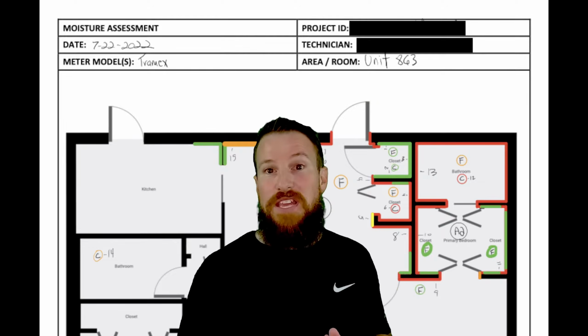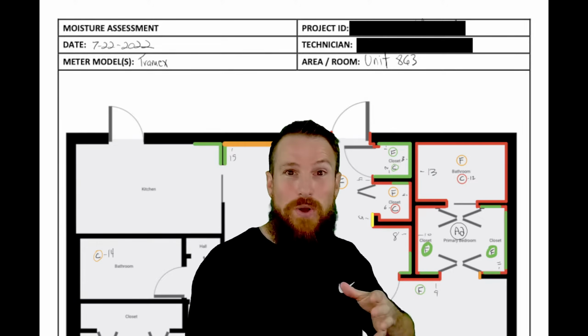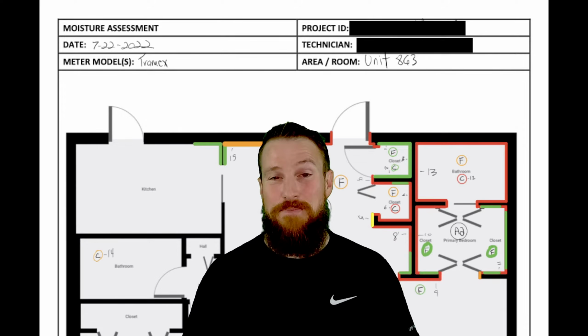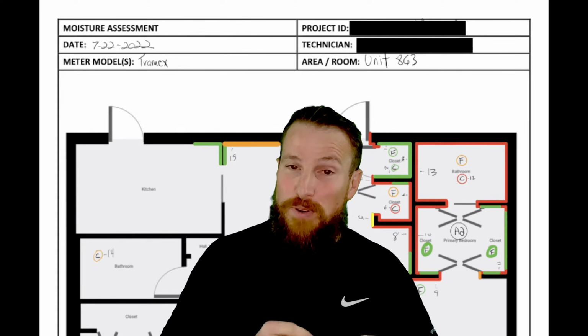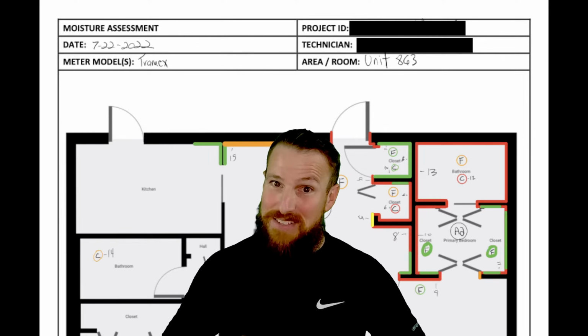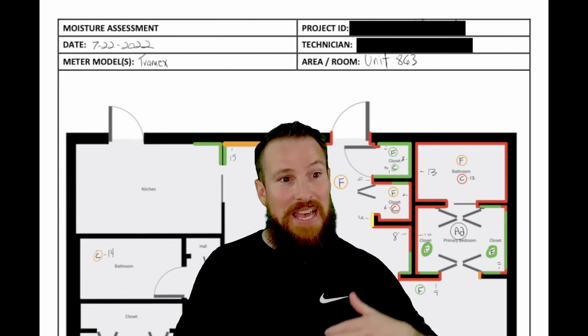Removing yourself from the equation, because after all, you are still going to be documenting this on your own. You have to. Otherwise, you're not going to know what equipment can come out what days, what equipment can move from here to there. You still have to be tracking these metrics and logging this documentation day in and day out on your end. But what this does is remove you from the equation, right? This makes it a little more objective, a little less bias involved, where you've got a third-party company now coming in and effectively overseeing the project at hand.